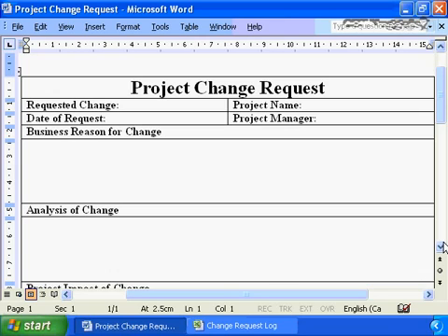If B is documented as a flaw in the requirements definition document and the business wants to change that, issue a change log that says on X date you issued a change, with the business reason for change, B is no longer a flaw, analysis of change, business impact of change, final signature. That is your approval. That is your justification. That is your audit trail that validates whether or not B as a flaw is included into the final system. If it's on a document, if it's been signed off, if it's approved, that's what your project is obligated to deliver.